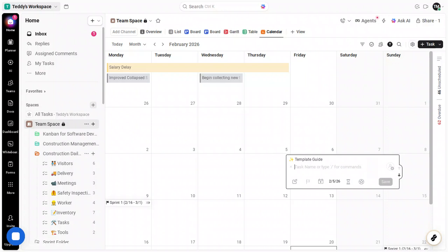Next, set time estimates for your tasks. Estimating the length of tasks is a best practice for planning capacity and aligning expectations. It helps your team measure goals within a specific time frame and see whether the week is realistically balanced. Open your entry and add a time estimate. For example, set it to 3 hours if that's what you expect it to take. This small detail pays off when you're coordinating across multiple people because you can quickly spot overloaded days or underutilized windows. Once you've set the estimate, click Save to lock it in.